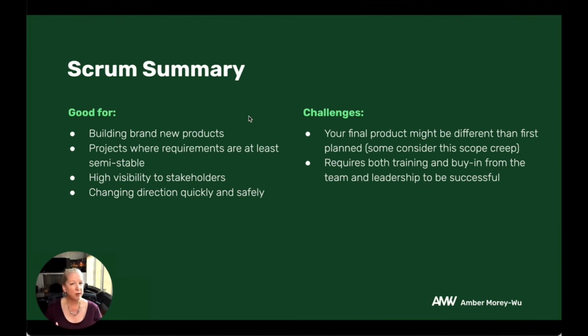And if you have a leader who doesn't understand that, they might come in and say, hey, I really need this other thing done. Can you just add that to your sprint? You're like, why don't we put that in the backlog and prioritize that for the next sprint? Now, if that leader understands, they'll realize that they're risking a sprint by trying to add something to it and potentially causing overtime or churn. They'll be like, okay, yeah, that makes sense, put it in the backlog.